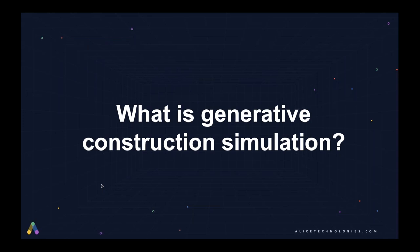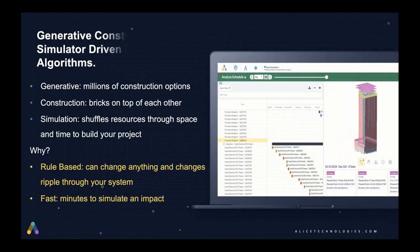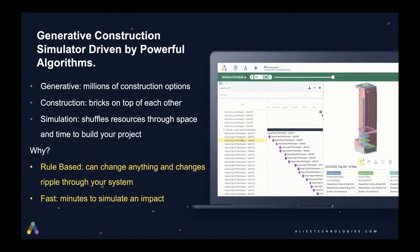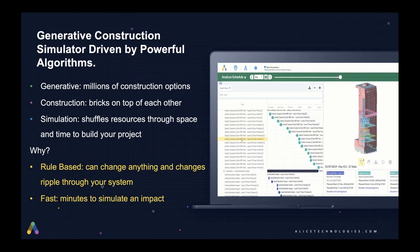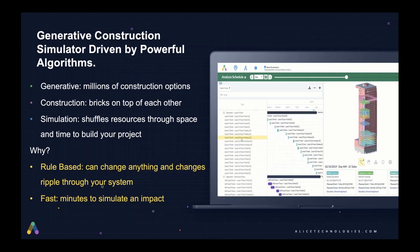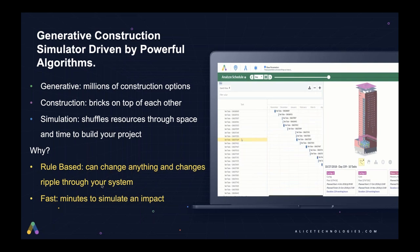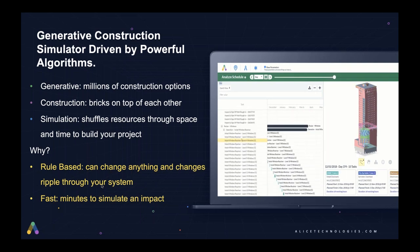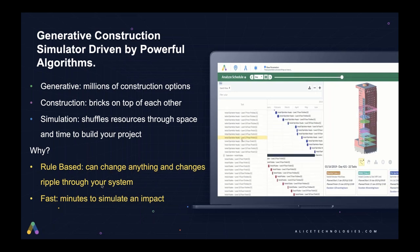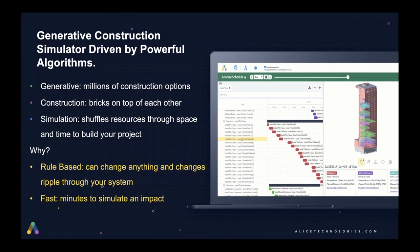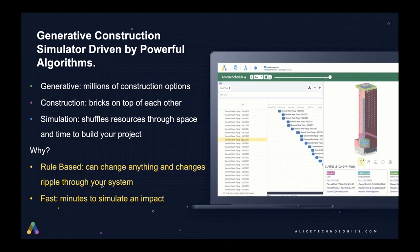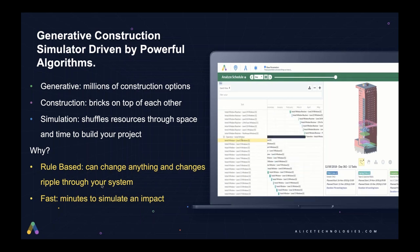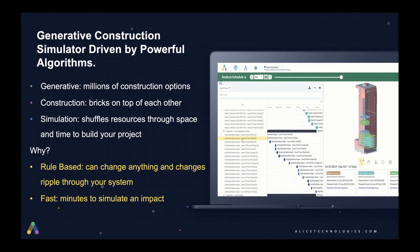Typically, this is a manual process, but leveraging artificial intelligence, contractors can do this in minutes. And when you want to increase your working hours, maybe it's a double shift or a staggered shift or Saturday work, you can understand how that change will ripple throughout your entire system with generative construction simulations.